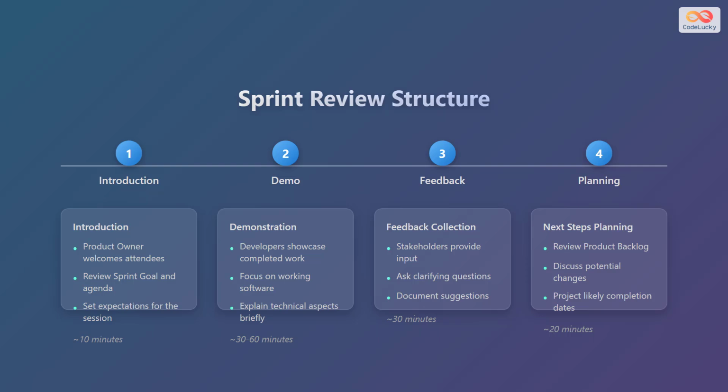Then, feedback collection, where stakeholders provide input, ask clarifying questions, and suggestions are documented. This takes approximately 30 minutes. Finally, next steps planning, where the product backlog is reviewed, potential changes are discussed, and project completion dates are estimated. This takes about 20 minutes.